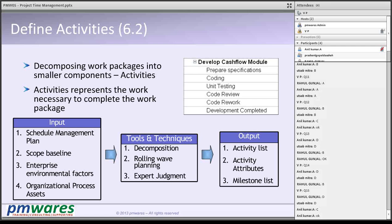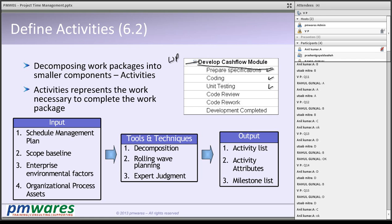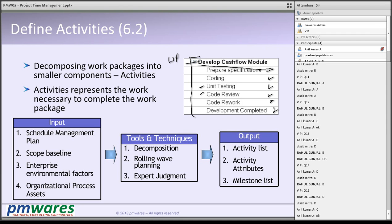The first process is define activities. For example, take software development of a financial product — we need to develop a cash flow module. That is the work package. To produce this work package, I need to write a specification, do coding, do unit testing, get my code reviewed, and based on problems found, do some rework on coding. Once done, my development is complete and I have produced the cash flow module. This is how we identify the activities for each and every work package.